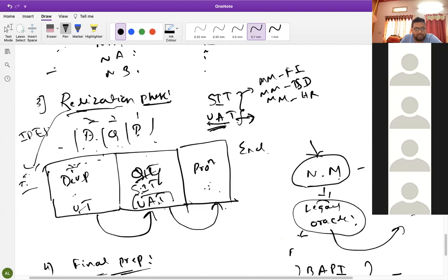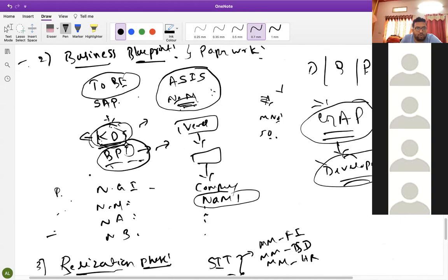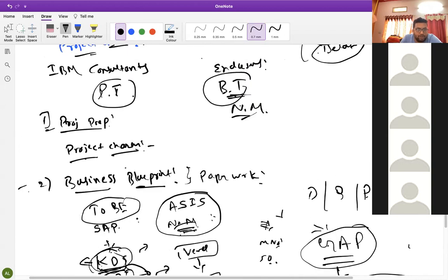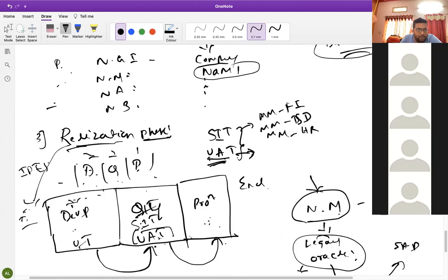First I will explain what the problems are here in ASAP methodology. As I told, the user directly uses the system here, in UAT. In the development server and business blueprint, we showed them the configurations and said we will do it like this, and these people will say yes. Once they start using it directly here, then only they will face problems, right?